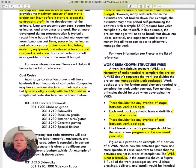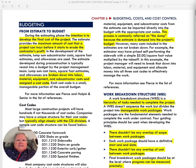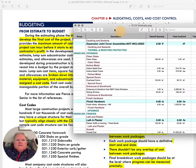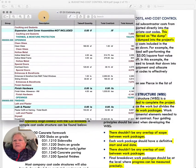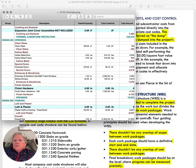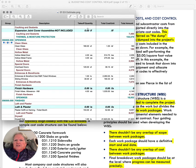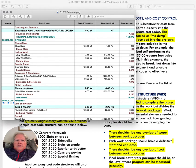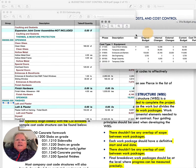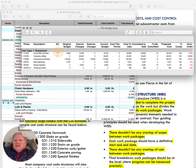Here's an example showing the transition from estimate to budget. This is just an excerpt from a budget done by work breakdown structure. You can see the quantities, the total amount, and it goes by CSI codes as you go down the page. We want to translate that into a budget — here's a sample of one, though not for the same scope. Budgets will give you a cost type, which is what we talked about before.